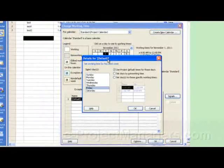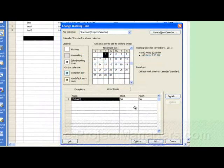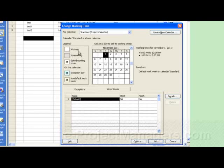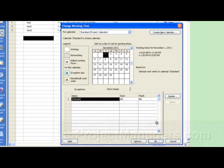Now that we've set the details for the default, we can click OK. You can see that the gray columns that were here on the weekends are no longer gray, which means the non-working days are now working days. They all appear white because that's the default color. So this is one technique you can use to give yourself a 7-day workweek. It's in your default calendar so you can go ahead and use it.